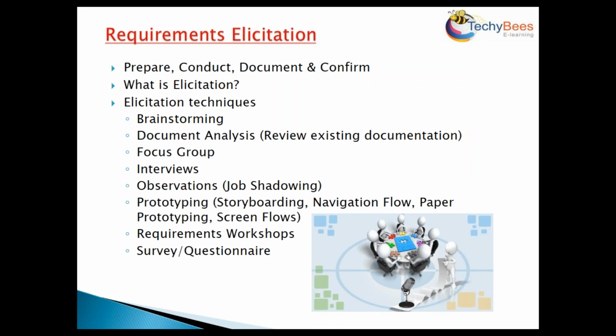You must make sure that you collect all the required basic information, to see whether you will be able to implement or create the product within the environment that you have within your organization. The infrastructure in your organization or the expertise that you have may not match the requirement that the client is asking for. A particular technology in which the system must be created is a niche technology or a very specific technology for which you do not have a development resource, and you have to hire a development resource. So it could take at least 2 to 3 months to get a resource on board.